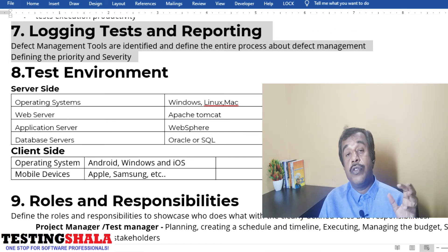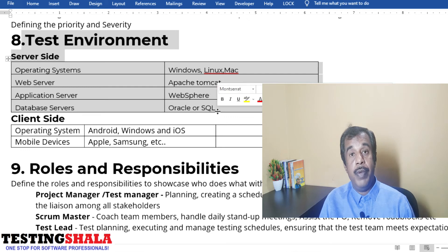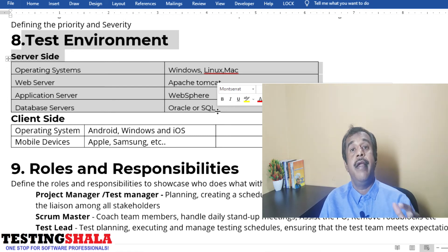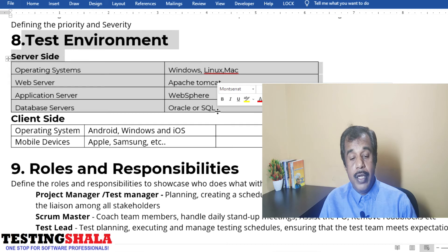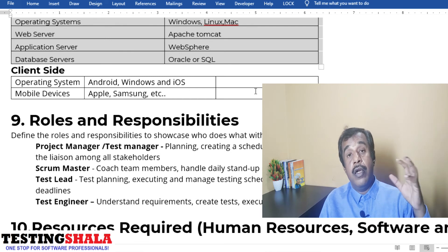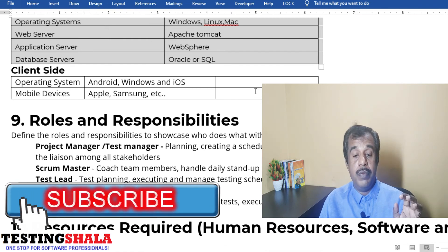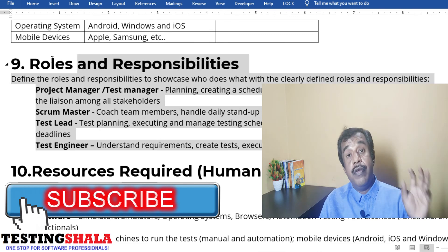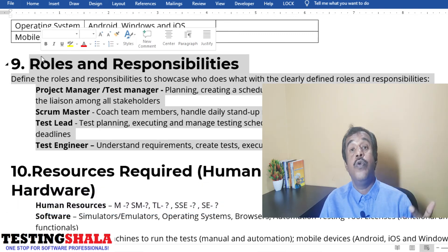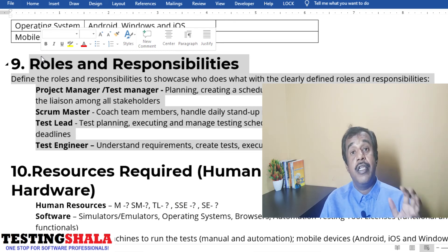Section eight is the test environment. Document the operating systems, web servers, application servers, and database servers being used. You can get this information from the development team or from the RFQ. Also document client-side devices — Android, Windows, and iOS devices — and the latest devices that need to be procured. Section nine should define roles and responsibilities, clearly stating what different roles exist in the project and what each person owns.